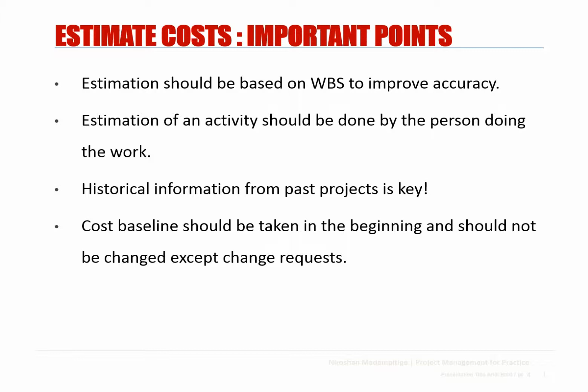Estimation should be based on the work breakdown structure to improve accuracy, because the work breakdown structure was the overall snapshot of your project. It included the work packages delivered to our clients. Estimation of an activity should be done by the person doing the work, because it changes the activity's duration and also the activity effort and activity cost. Therefore, the performer should make the estimates.